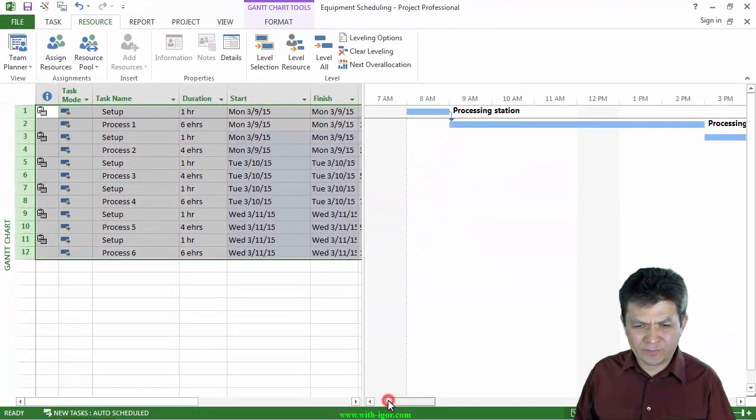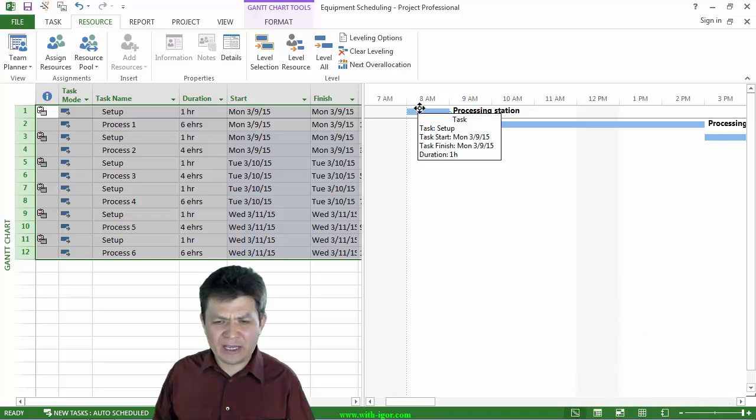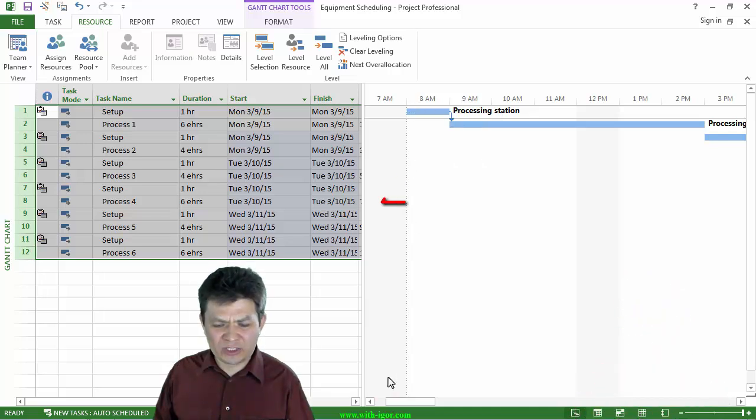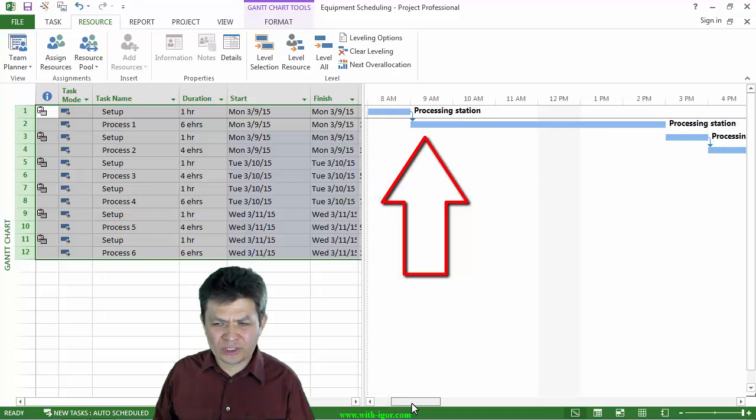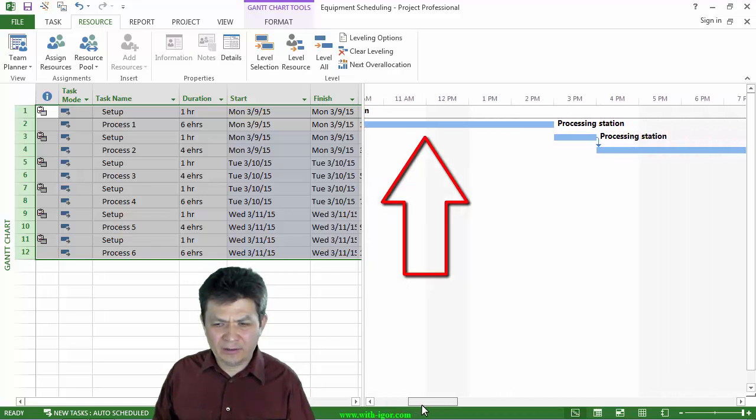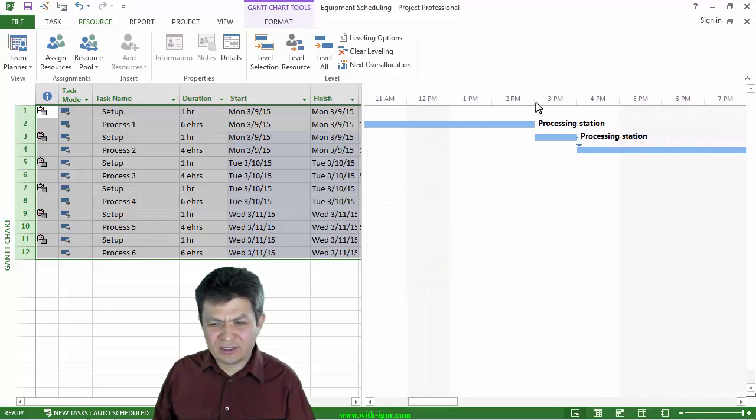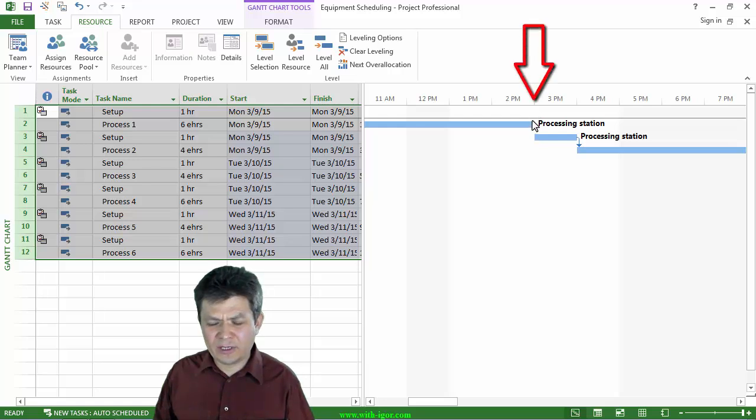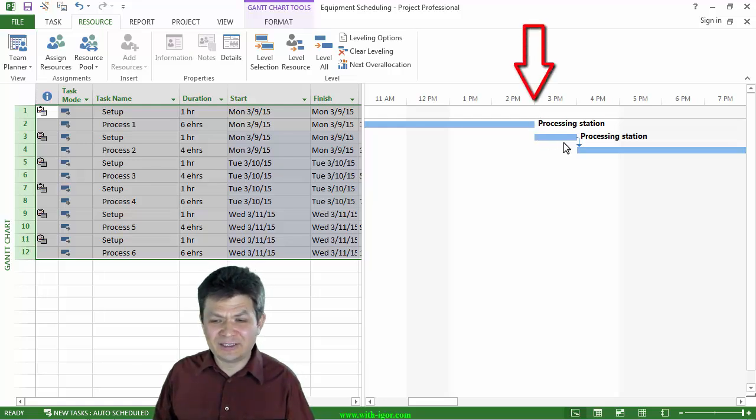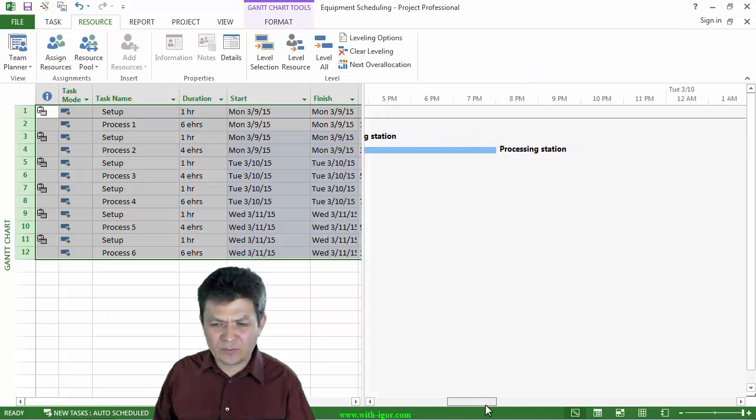So let's take a look at it. I have a trigger task set up at 8 a.m., which is business hours, and then a process is running. And the process ends after 2 p.m. at 3 p.m. Then we can start the next setup immediately because it's business hours and run a process.